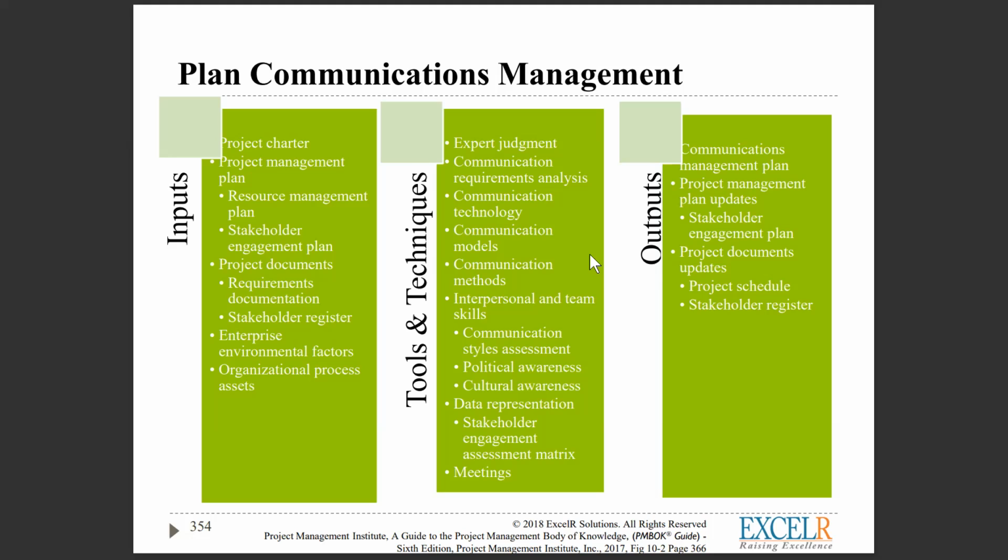In BAU, you raise a change request, and you agree that in a given quarter I will execute only 10 or 20 changes. If it is more than that, there will be a change in the maintenance agreement.